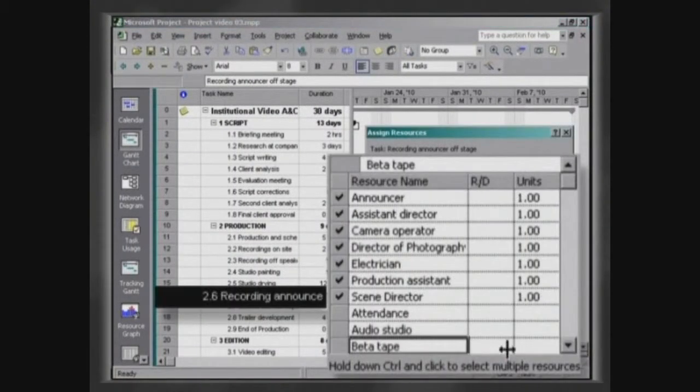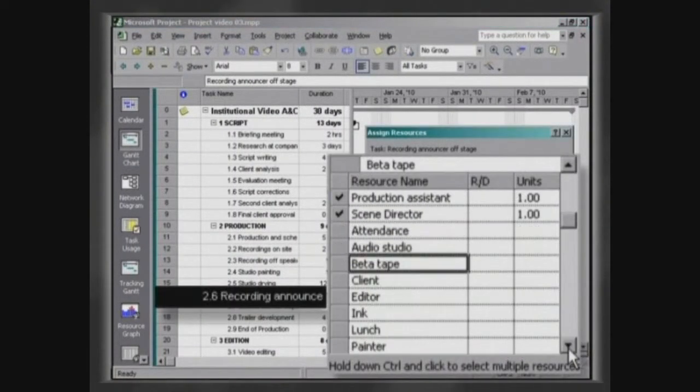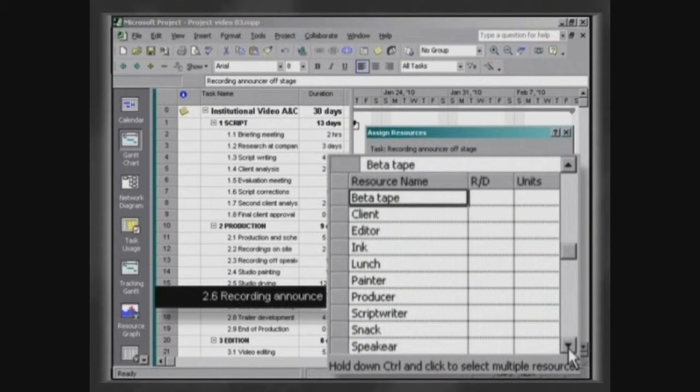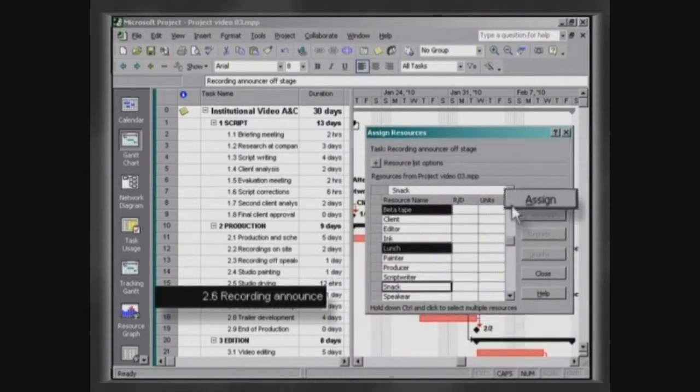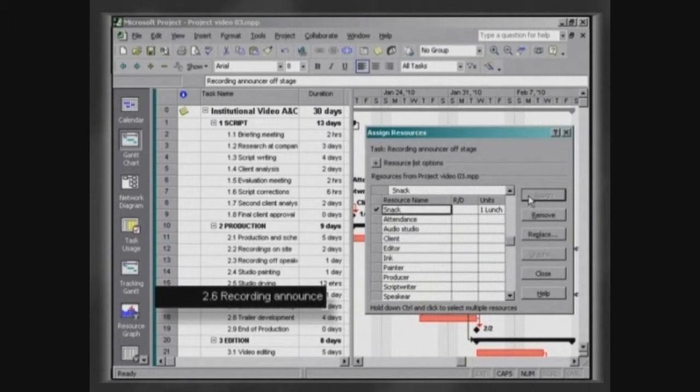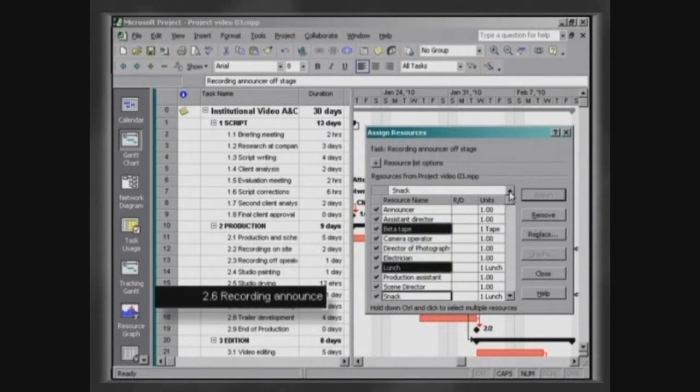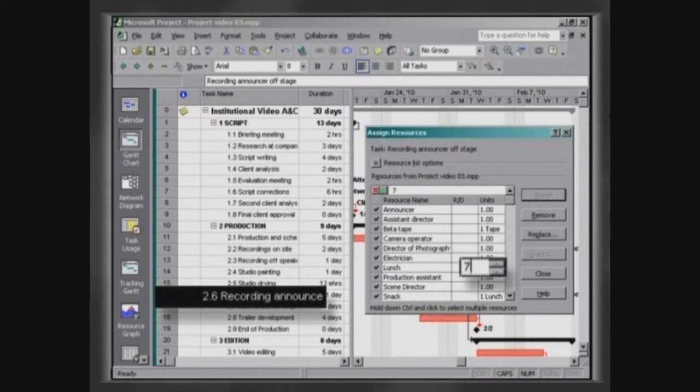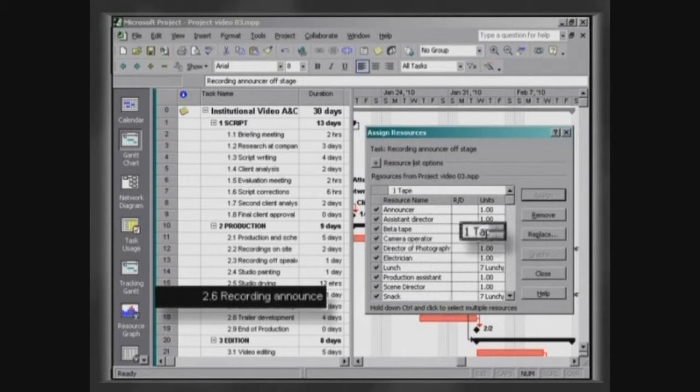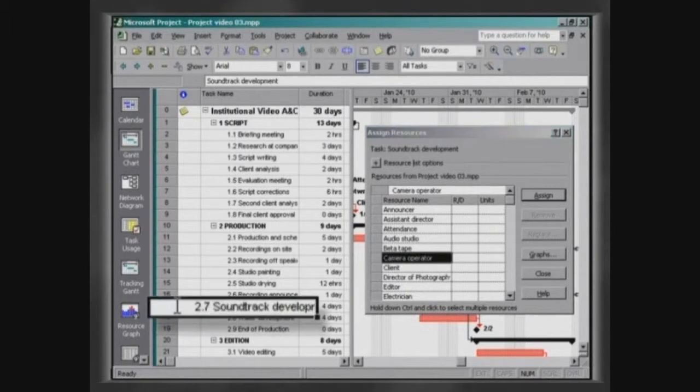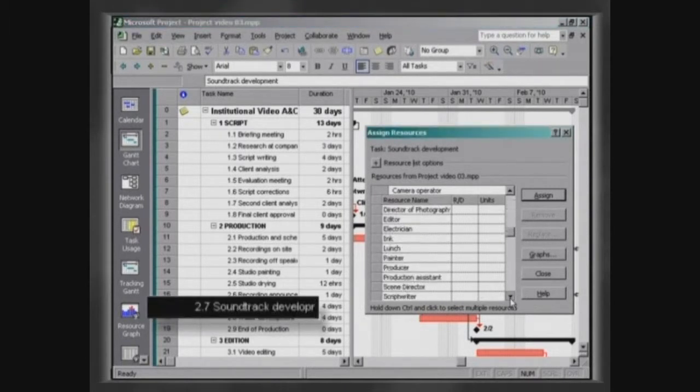Assign the resources beta tape, lunch and snack to the activity recording announcer off stage. Since we have inserted an additional work resource into this activity, the team has increased and the number of meals should be changed to seven per day. Two beta tapes will be required for this activity. When trying to attribute to the activity soundtrack development to the resource musician, you will see that this resource does not exist.